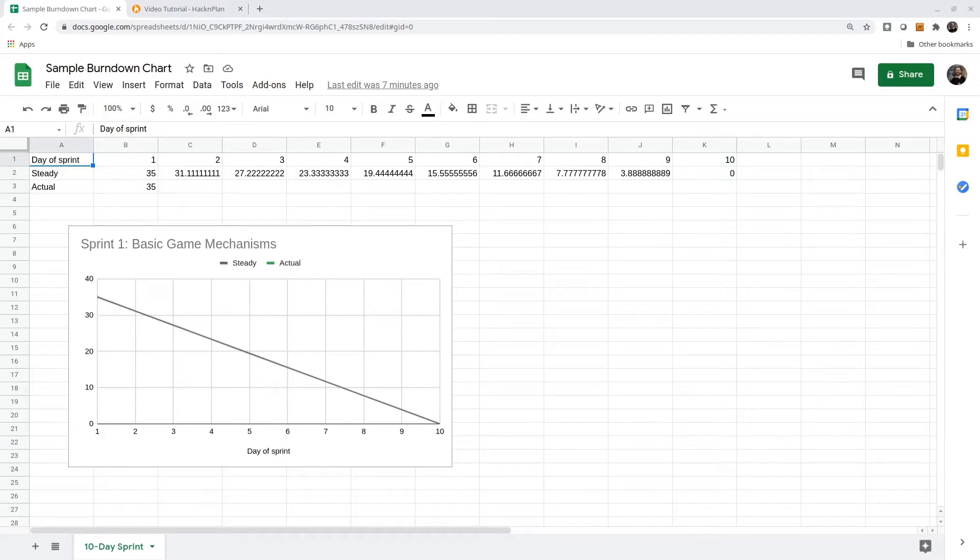One of the tools that I regularly use when I'm mentoring project teams is the burndown chart. Here's a sample chart for a 10-day sprint where the planning meeting has determined that there's 35 hours of work to be done.